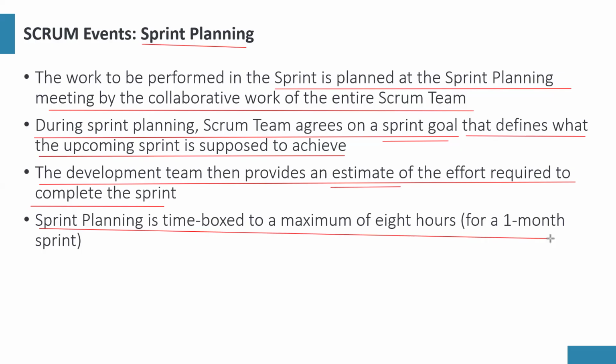No. So, sir, we're talking about sprint planning. If your sprint is going to be 4 weeks, you say 8 hours. That means you block a whole day for sprint planning for the month. So if your sprint is 2 weeks, how much time should we block out for sprint planning? You get what I'm saying?